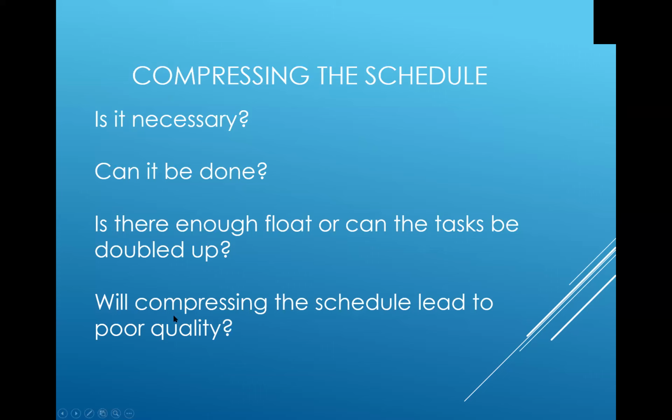So let's talk about compressing the schedule. You need to ask yourself, is it necessary? Do I need to compress this schedule, or am I going to cause problems by doing it? Is there enough float, or can the tasks be doubled up when compressing the schedule? It's very important to make sure that you're not overly burdening your subcontractors or creating an unsafe work environment by compressing your schedule.